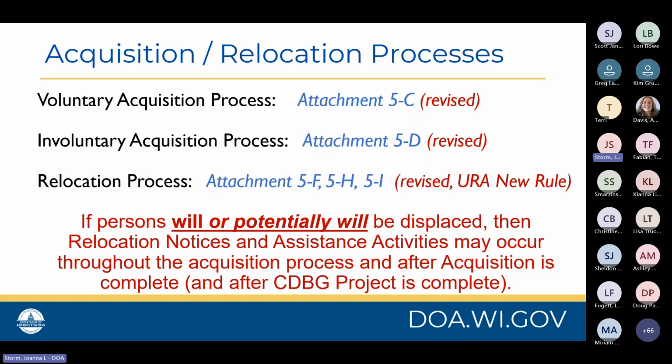Note that if persons will or potentially will be displaced as a result of your project, then those relocation notices and assistance activities may end up occurring throughout the acquisition process and after acquisition is complete, and possibly even after the CDBG project is complete. So those may be ongoing through and potentially after completion of the CDBG project.